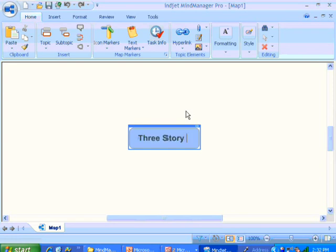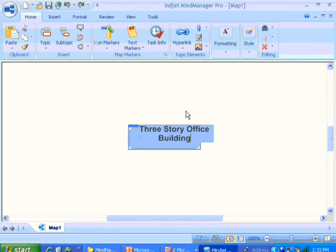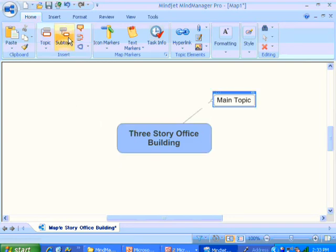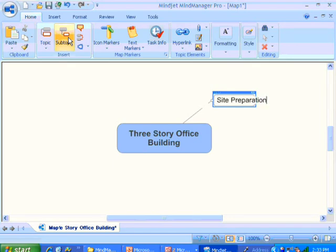We're going to use it to develop WBS for this project called Three Story Office Building. You can imagine a project manager sitting around with his team. Maybe the first thing we want to do is add this first item into WBS by clicking on Subtopic. And we're going to call this first item Site Preparation.